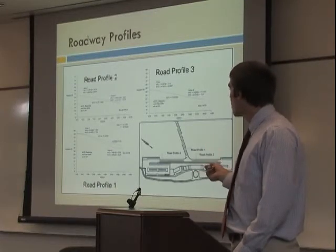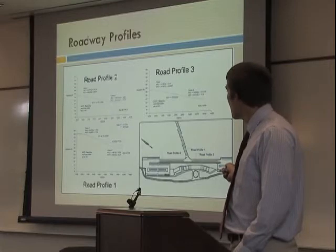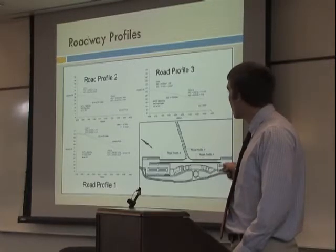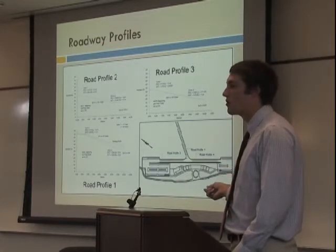One of the largest concerns for safety in the transportation of this site is the large road with a steep grade coming straight down to the site. In order to mitigate any effects of a runaway truck, we will have a crash barrier installed in the 5-foot gap between the road and the retaining wall, which will consist of extra strength guardrail and an earthen mound with buried jersey barriers.